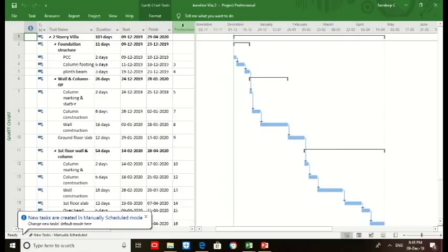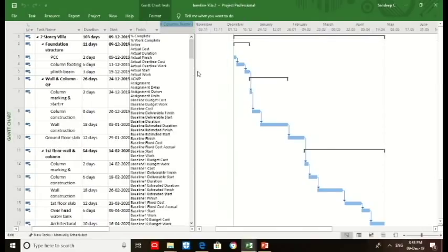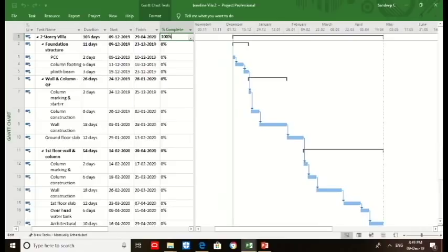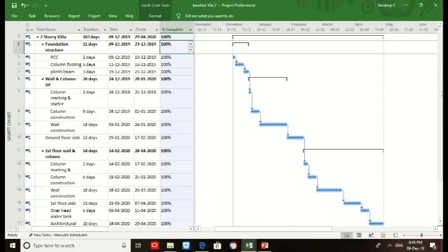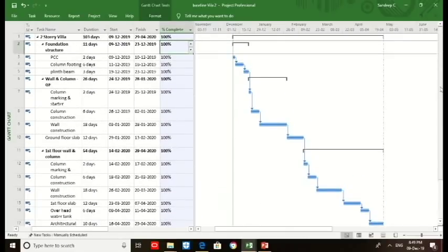Then we click on the column, insert column. We choose as percent complete. We create all this percent task 100 percent complete as planned. So we can see, in a baseline to create a physical planned S-curve, we should make all the activities as 100 percent complete.